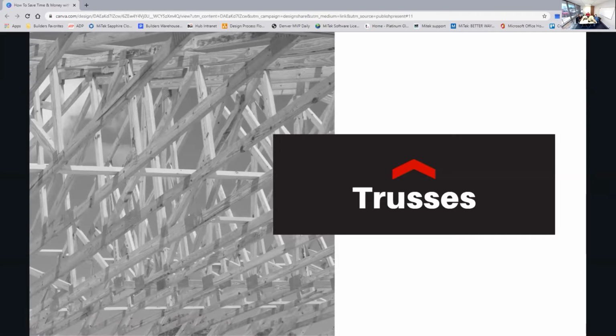So one thing we do during the design process, we have a submittal process where we'll go through and design as best we can with the plans that we have, the information we have, and we'll submit that off to the customer, the architect, the engineer, potentially the framer as well. They have the opportunity at that point in time to go through, and our designers will cloud areas that they may have had questions on. They may even put some questions on the submittal itself.